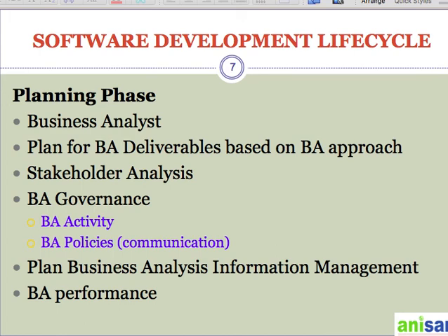Then business analysts also have to plan for the BA governance: how the project governance will work, and what the different committees will be. There could be a management committee, steering committee, working committee, and who the stakeholders will be as part of the committee, what their role within that committee will be, who will make the decisions that will be captured, how often we will meet, how we make the decisions, what kind of communication will be happening during that time, and whether we are using any tools like that. Okay, so all this planning must be done during the planning phase.